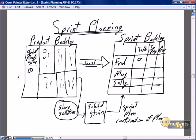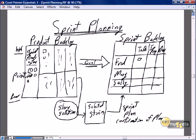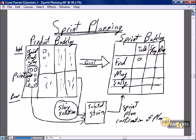Our sprint-ready stories should be prioritized, with high priorities at the top and lower priorities at the bottom. Story selection should be as simple as coming to our sprint-ready stories and selecting the top eight stories off the product backlog and moving them down as selected stories. It is almost that simple — the story selection starts with the product owner picking the top eight and saying: these are the stories I want you to work on in the next sprint.